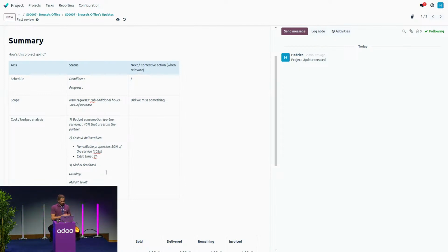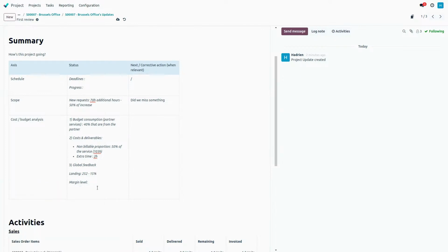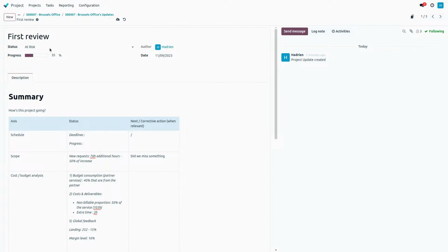In my global feedback, I have two things. We are at 222 hours. We have 30 hours to finish this. So my global feedback is that we're going to end up at 252, which is an increase of, let's say, 15% of my budget, which according to me is okay, but I don't know what is the acceptance level of my customer or my company. The margin level, we have seen it, it's 16%, so it's quite okay. Eventually, I would say that it's not risky because we are at the end of the project, but it would have been handled better. For the next part, I will wait to have my meeting with my manager to have more information based on that.